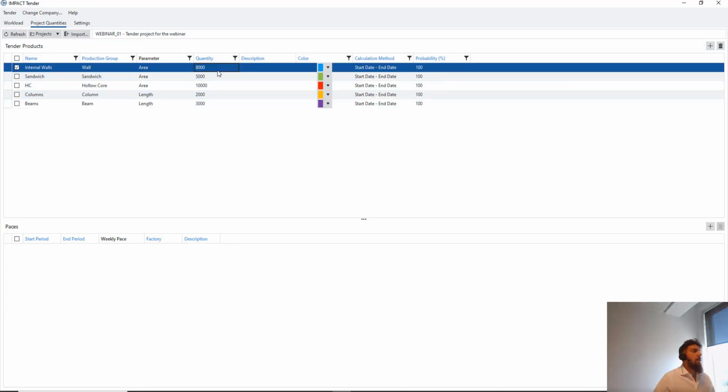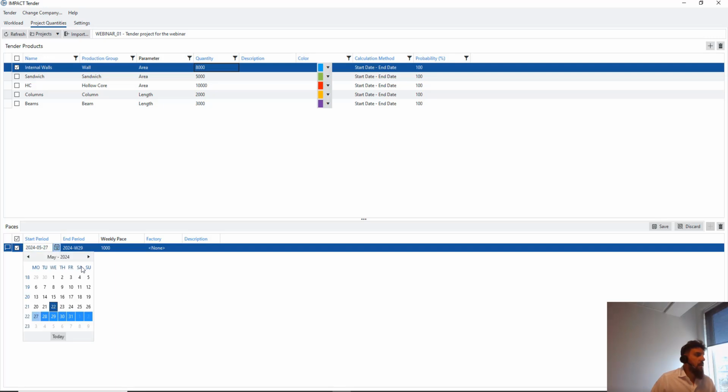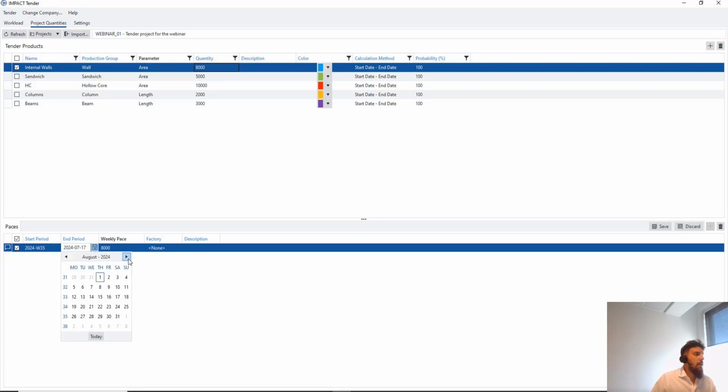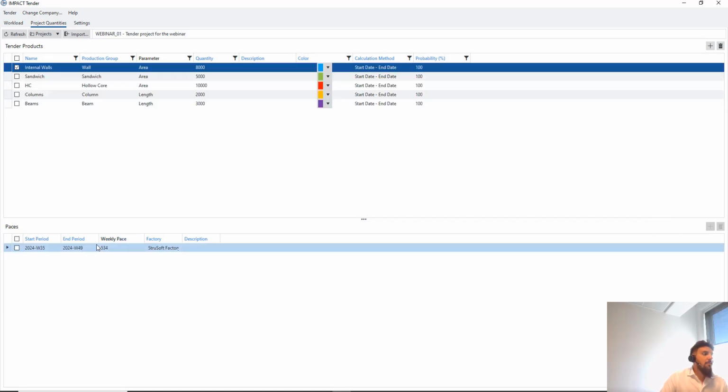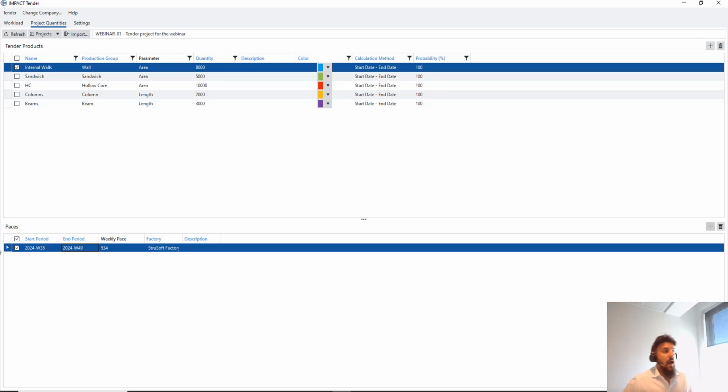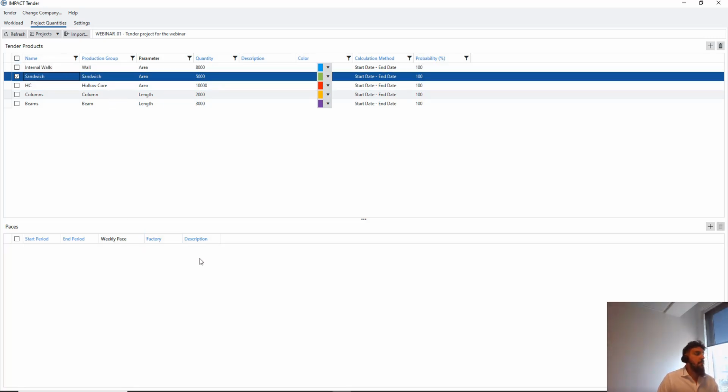So now I have made my products. Now I'm going to split the pages. So I will start the new page, and in every case, I want all these things to start from the 1st of September, and I know that my deadline is the 1st, or let's say the 3rd of December, right? I will assign them to a factory, and I get a weekly pace of 534 square meters of wall. I have to produce that in theory, right? I have to do this, and also, do I have the capacity to do this? Let's see. The same for sandwich walls.